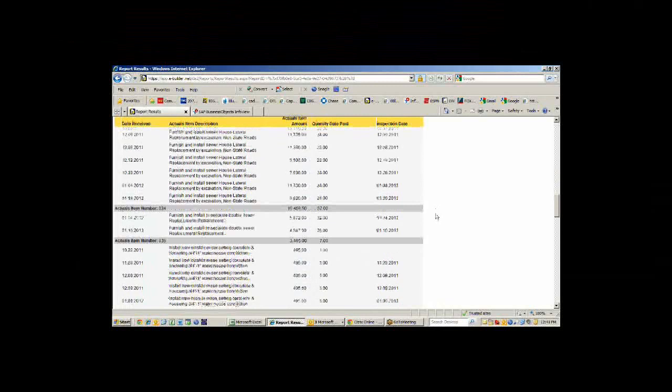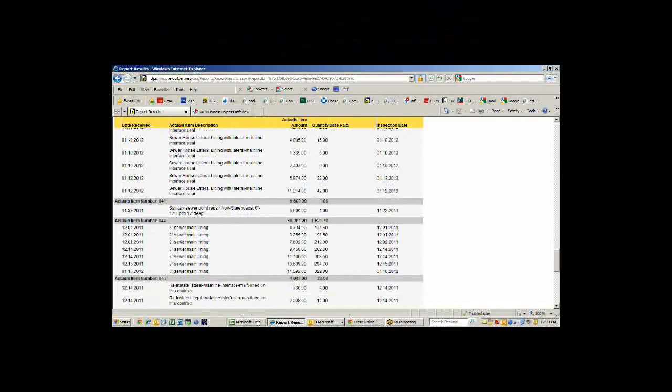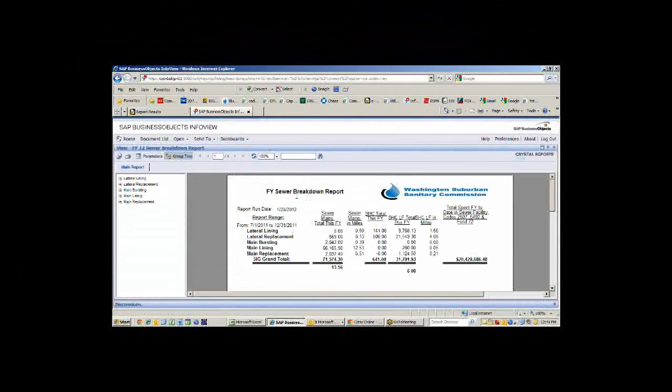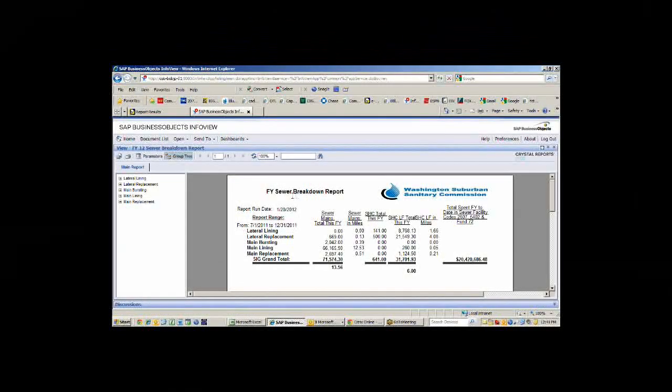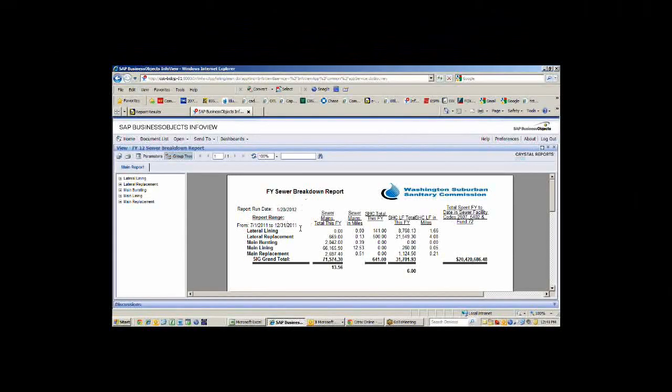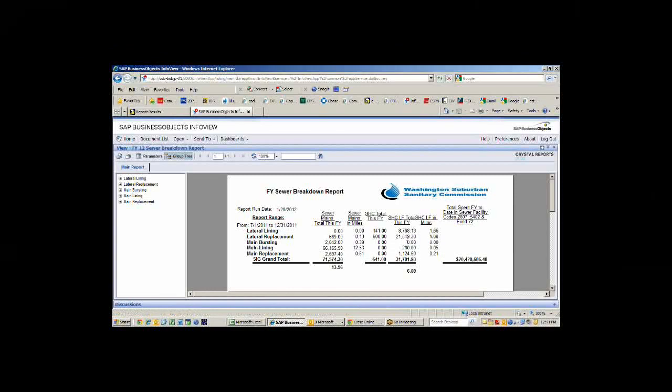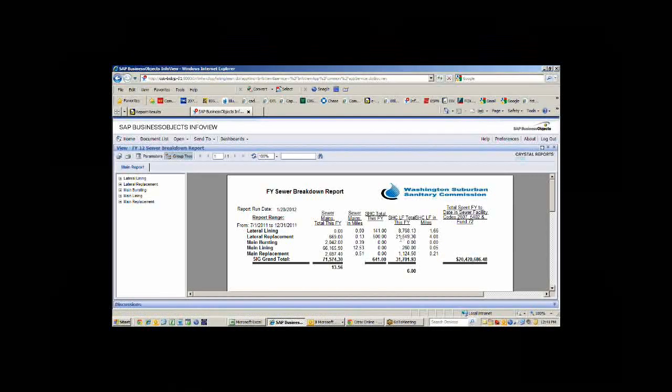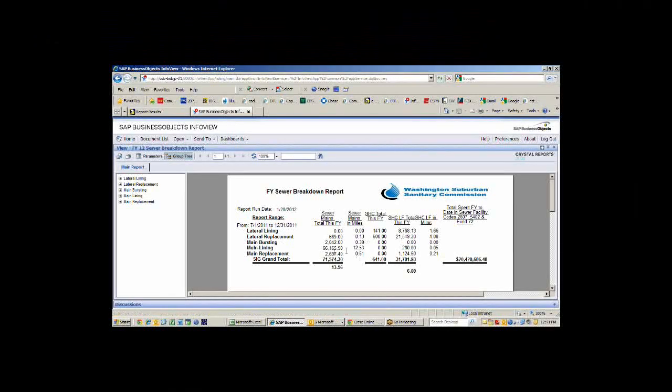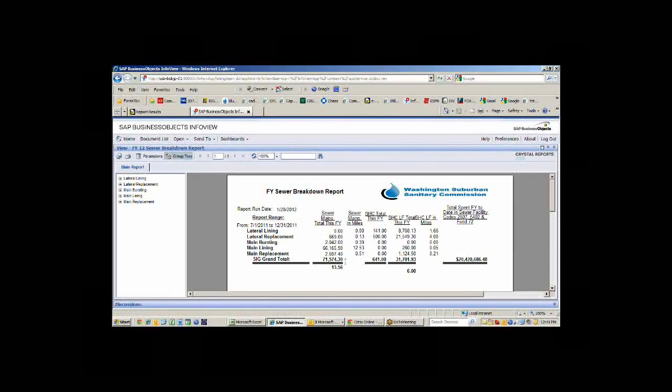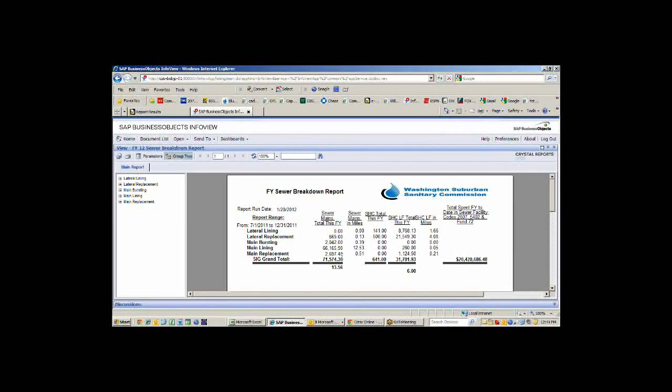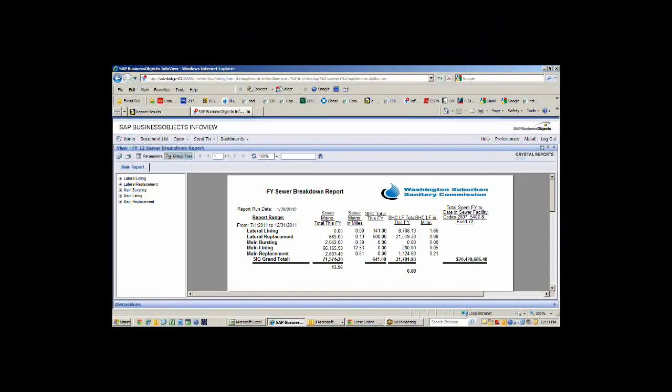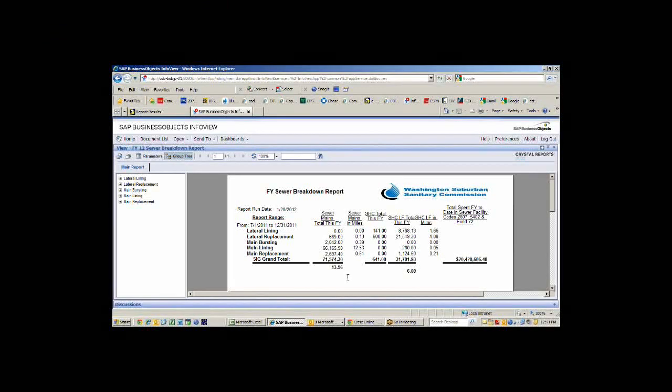Based on that, we basically dump all that information out every night, which gives us the ability to run a report like this, which shows you for this fiscal year, July 1st through December 31st, we've done 1.6 miles of lateral lining, 4.8 miles of lateral replacement, 2.39 miles of main bursting, 12.3 miles of main lining, and 0.5 miles of main replacement. Those are the numbers that our GM is looking for and our chief engineer as where our program is based on replacing this year 35 miles of sewer line.